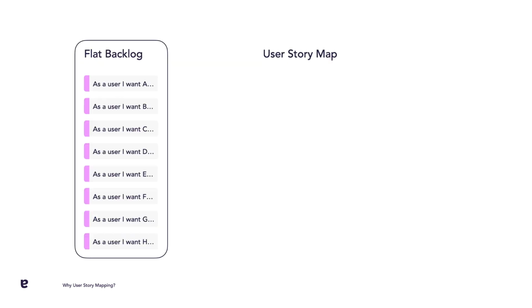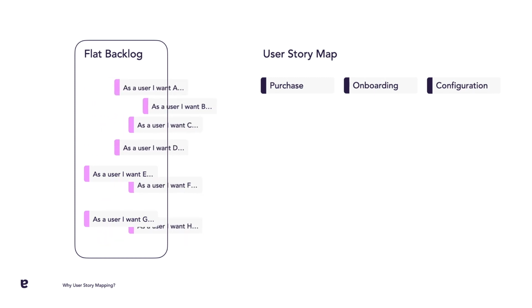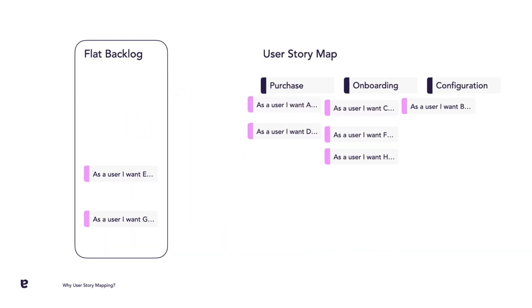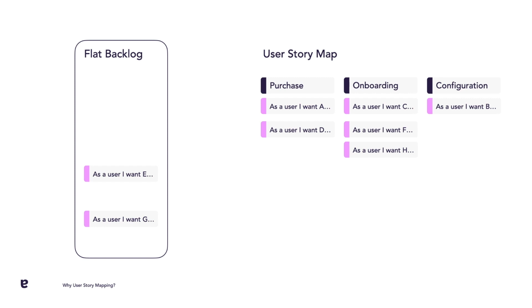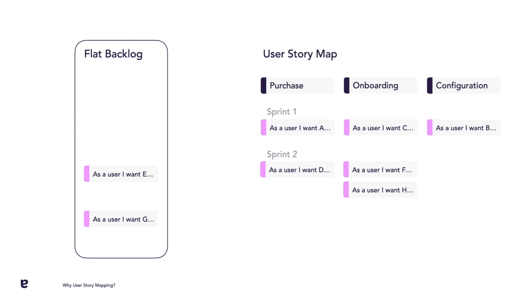User story mapping essentially converts the 2D flat backlog into a 3-dimensional view, because it gives us a way to say, okay, I'm currently working on building this user story, and I can visualize what piece of the customer journey this will be directly impacting, and we know when it will be delivered. Also, by putting the focus on the user, a story map ensures that the backlog contains work that adds real value for the customer by helping them achieve their goals.